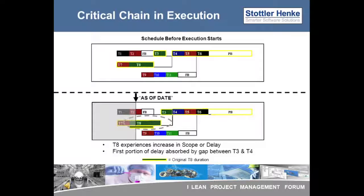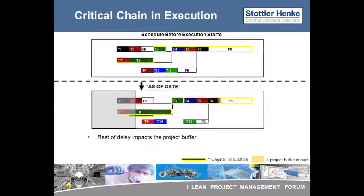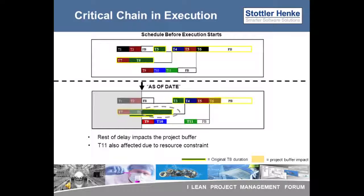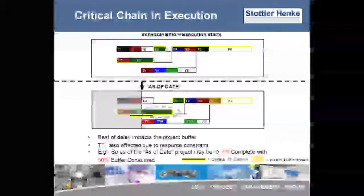When the next update is received, the estimated end date for T8 is even later. This delay affects the rest of the project and impacts the project buffer. Note how task T11 is also affected due to the fact that it uses the same resource as tasks T8 and T3. So T11 will not get access to this resource until T3 is done with it. But since T6, which is the integration point, is also moved right, there is currently no feeder buffer impact.